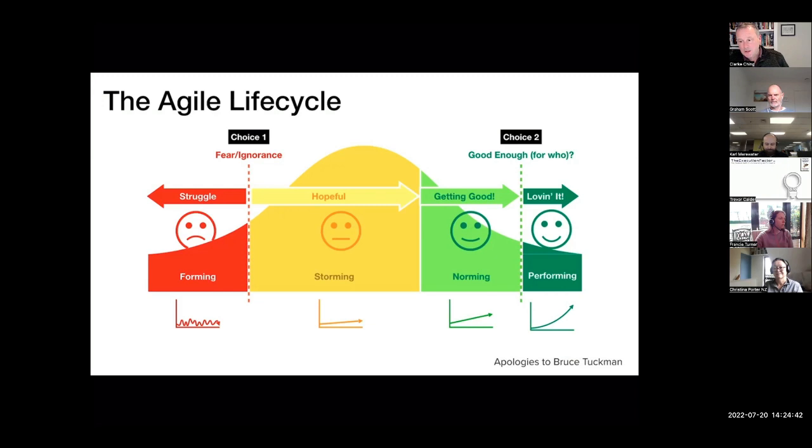But for Julia, they were building products they loved, and they were doing a really brilliant job. But building the best products meant that they could get, say, 4 products a year if they built the best ones, but the government department really wanted 20 just good enough ones. Just good enough.